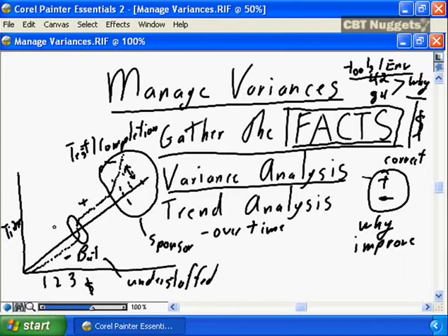So again, you're doing your trend analysis, you're managing the variances, and you're telling the project sponsors, don't get excited, we're understaffed, which is probably going to mean either we're going to be late or we're going to consume later. Which is in fact exactly what our project did. At month 4 in our project, we have begun the additional consumption. We brought the additional materials, we brought the additional team members in, and now, although we are trending away from the budget line, the net, for the sake of simplicity, is 0.